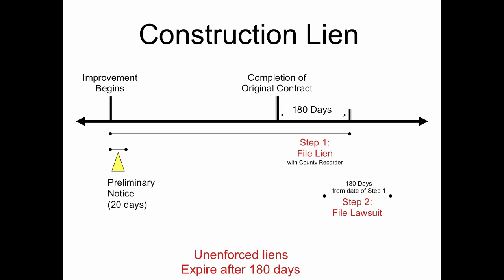Another type of filing in the State Construction Registry is a Notice of Completion. A Notice of Completion is usually filed by the property owner or the original contractor. If a Notice of Completion is filed, you only have 90 days to file a lien with the county recorder.